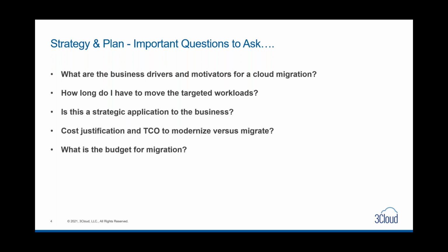So if we know that our timeline, and that next question, how long do I have to move the targeted workloads, is only 3 months, then I'm likely going to have to take a lift and shift approach, where I'm going to have to forklift those systems as is into Azure without making too many changes to them. We just need to get them over.